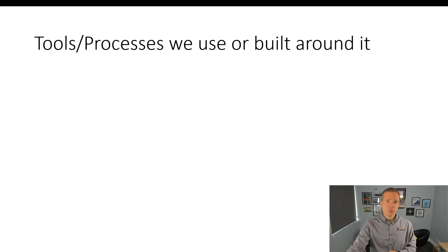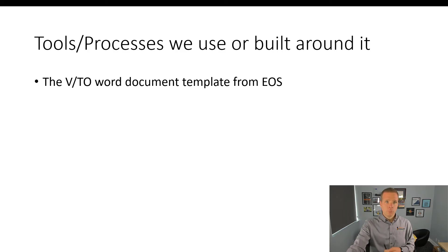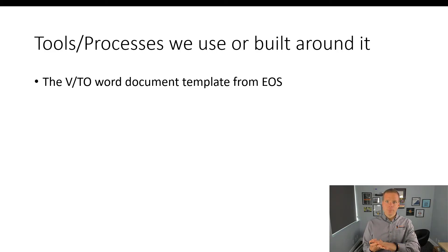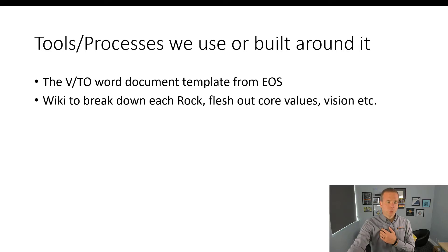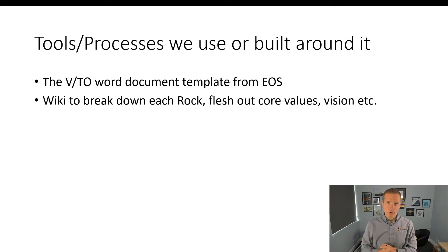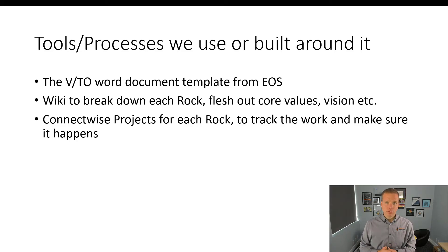As an MSP, here are some tools and processes we built around Traction. We started with the template from EOS. Originally we had one VTO for everything, but in the last six months we split it out so each of our three businesses — the two MSPs and Top Left — each have their own VTO. We use a Confluence Wiki to break down each Rock and flesh out the core values, with training modules for new hires. Everyone has access to the vision, mission, yearly plans, and quarterly plans. We use ConnectWise projects to track each Rock, and tickets flow into Top Left boards so we can make sure they happen around all the other work.